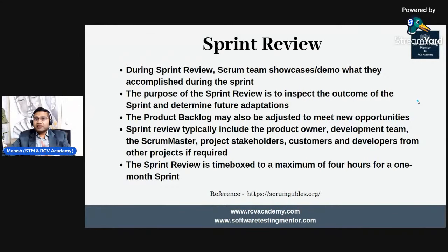If it's decided in the sprint review that we need to change something or add more functionality, that needs to be prioritized again, articulated as an epic or user story, and moved to the product backlog. It doesn't go straight to the sprint. It will be prioritized again, then sprint planning will happen, and based on priority those items can be picked.